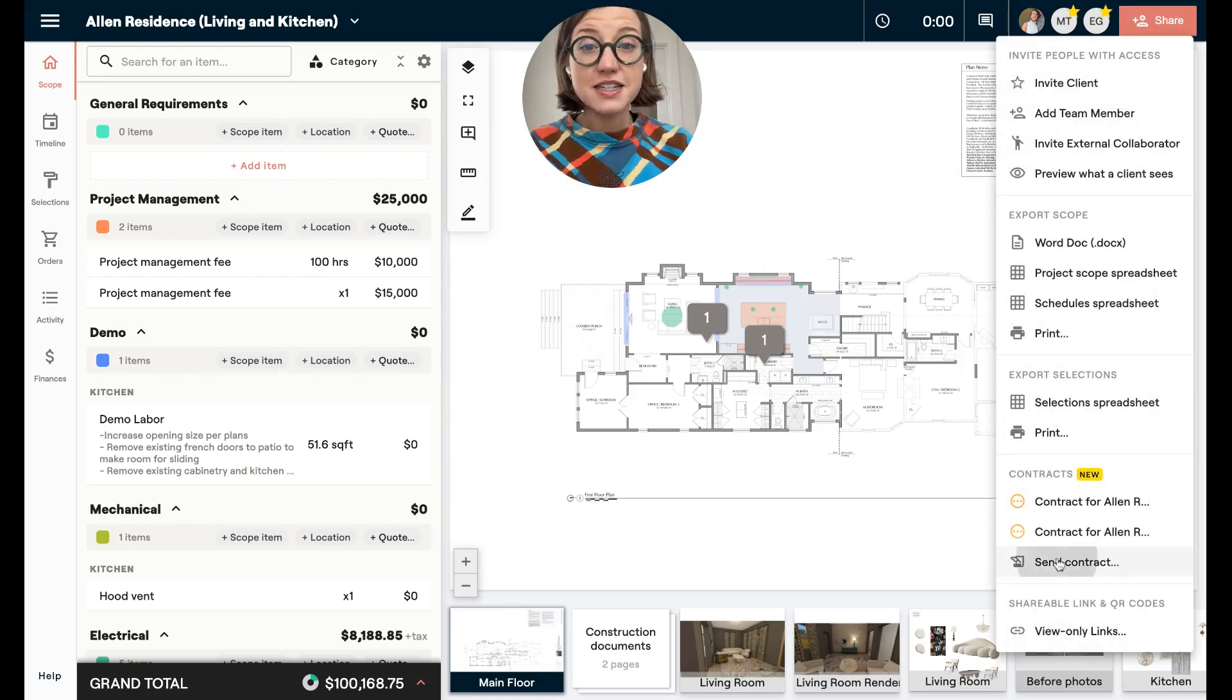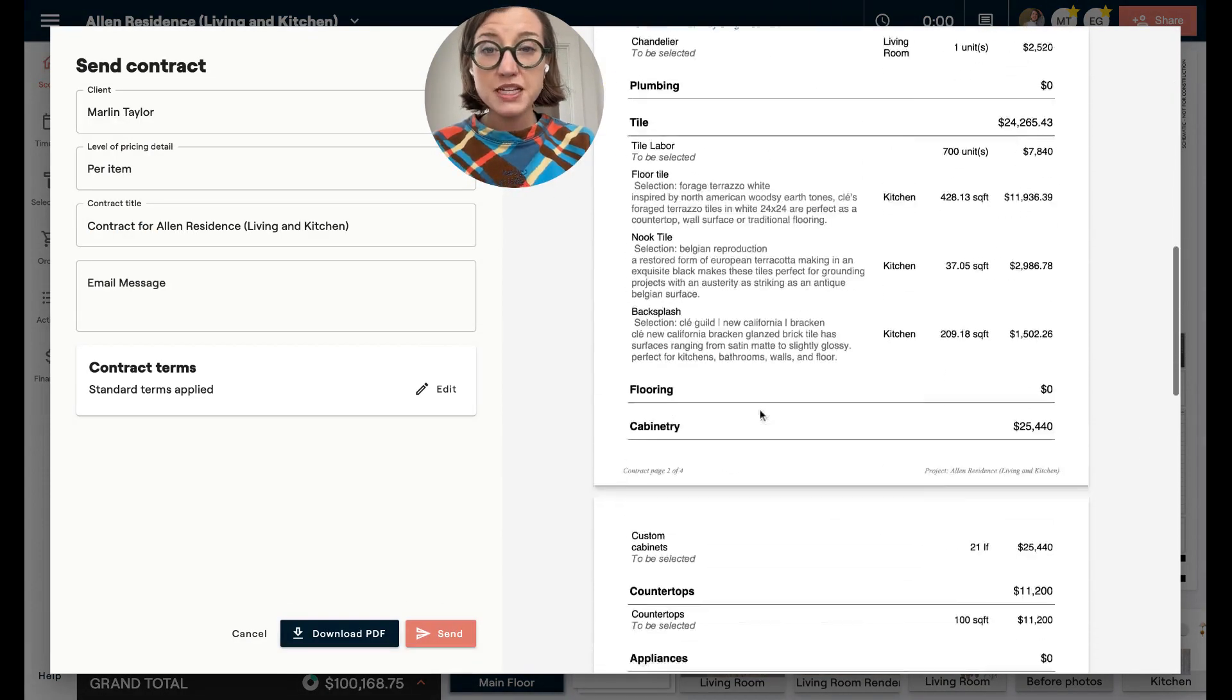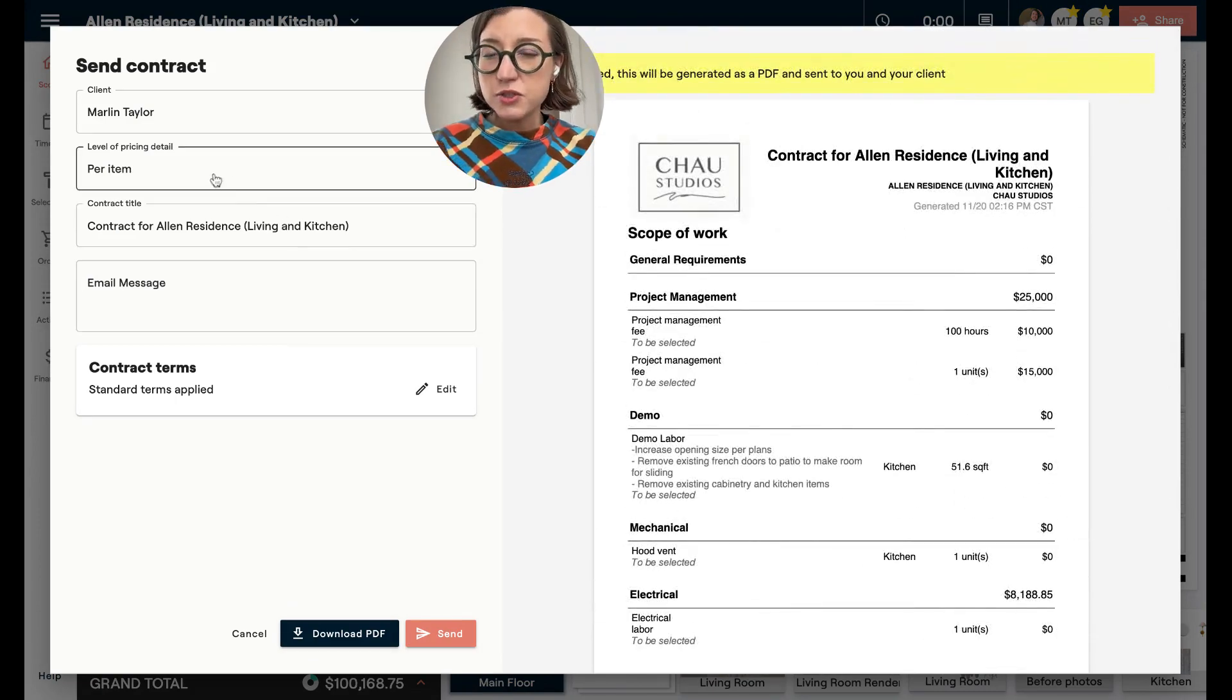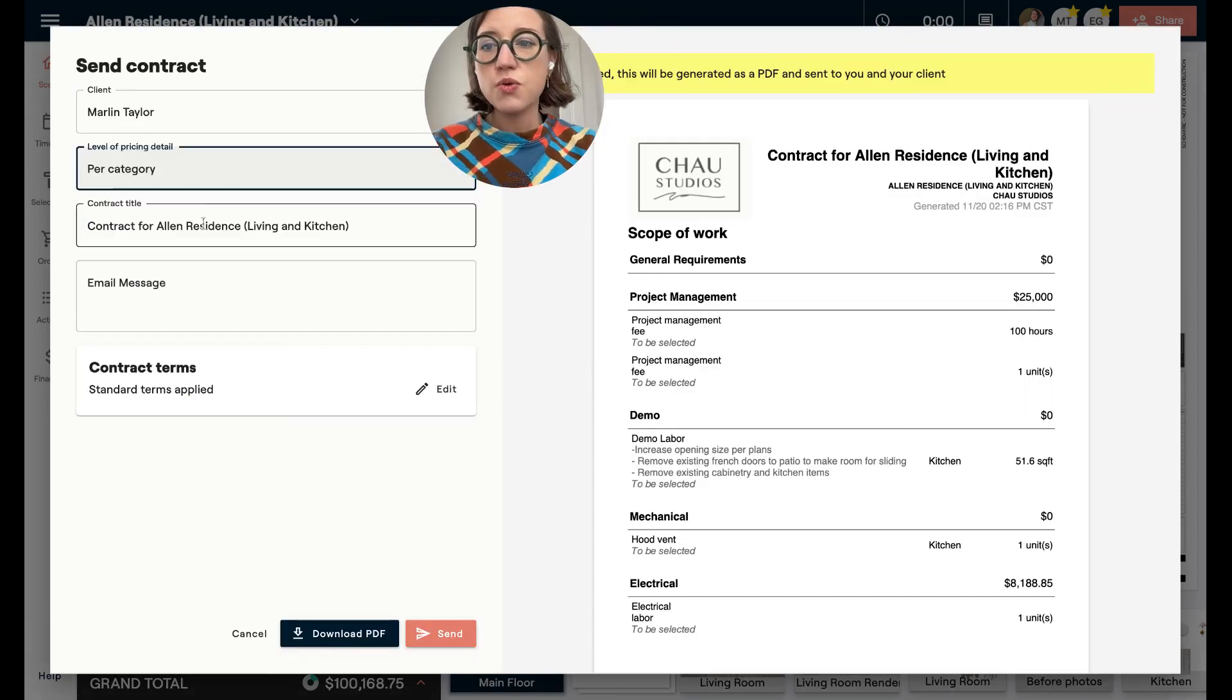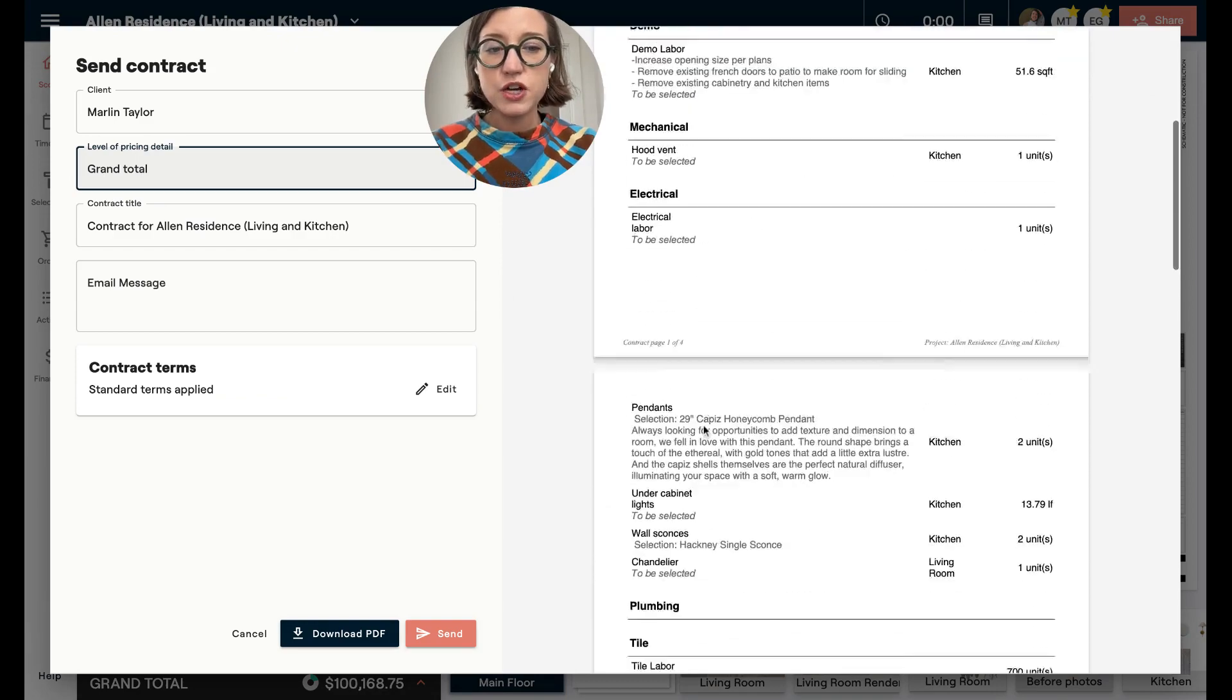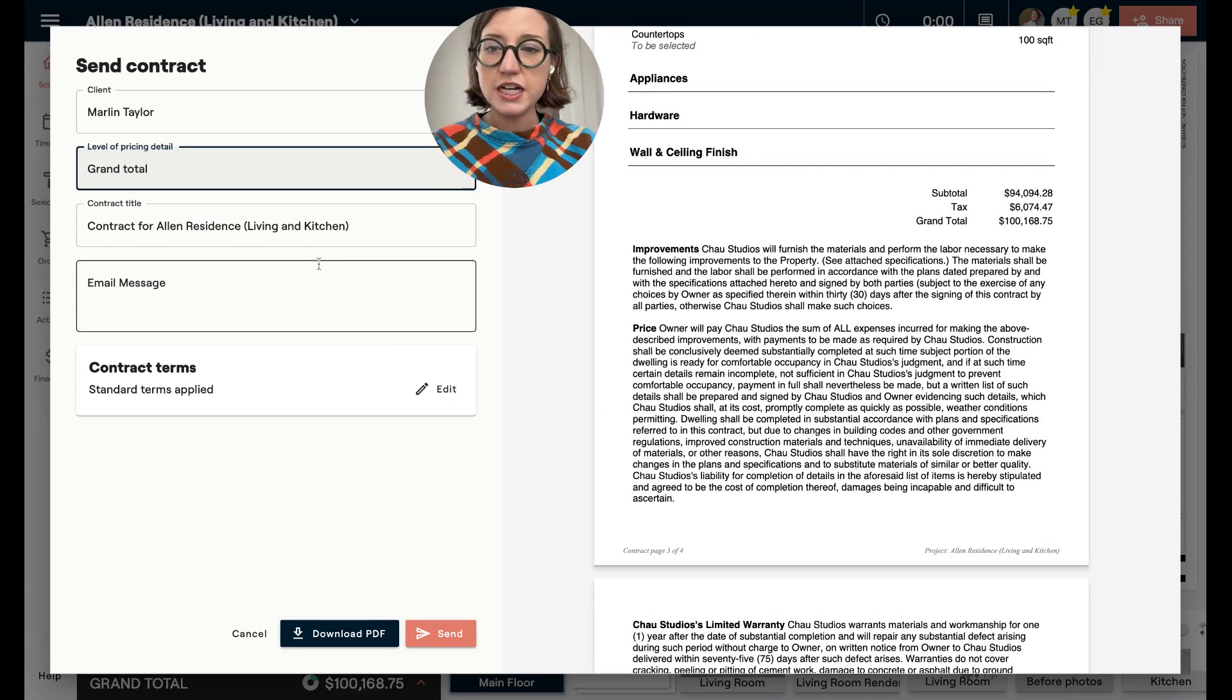And when you do that, Material is going to generate a contract based on your scope of work. Now you have some choices here. You can choose if you want to show per item pricing, per category pricing, or if you'd like to show a grand total, meaning you're not breaking down the pricing on each item, just a lump sum. So those are the options when it comes to showing prices to your clients.